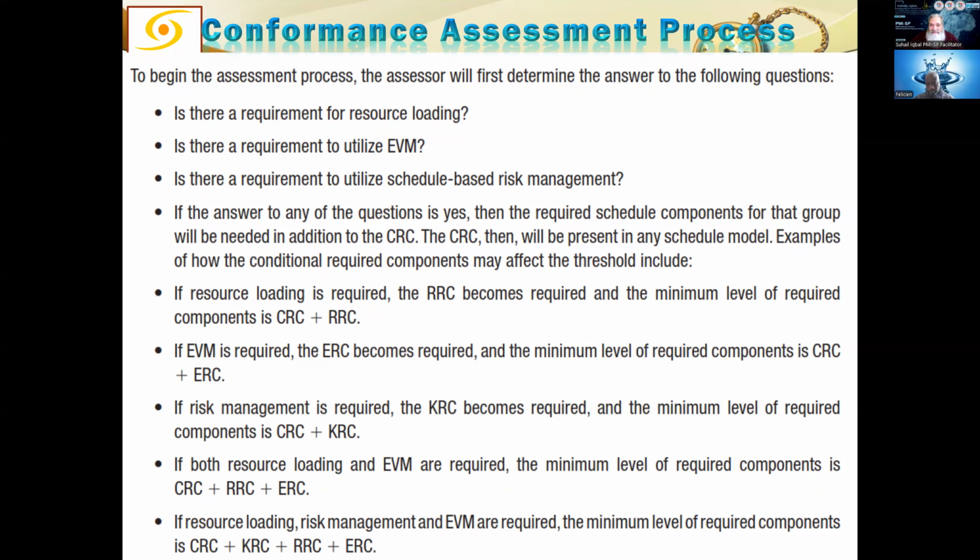And if you say yes, then ERC has to be added to CRC. Third question: is there a requirement to utilize schedule-based risk management? If the answer is yes, all the KRC items become mandatory. Otherwise not. So these are the three questions you must ask yourself before you start the assessment.